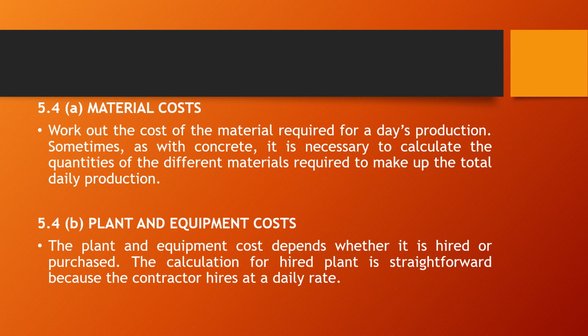And then you have to look at the plant and equipment costs. Is the plant hired or is it owned? It becomes simple if your plant is hired: you simply put in the hire rate, and then you include the cost of fuel.